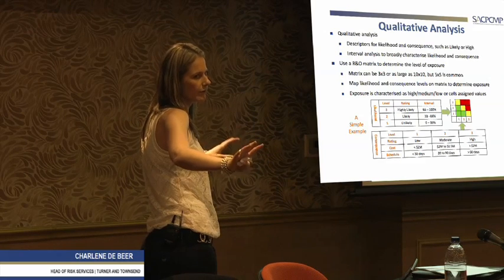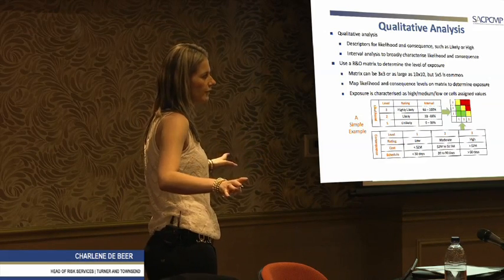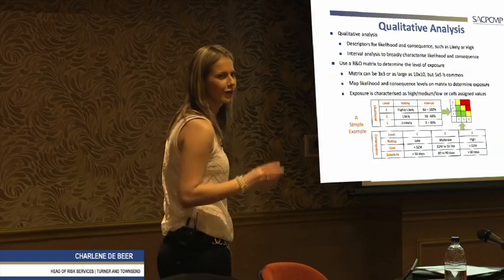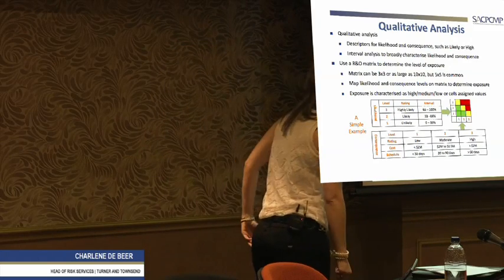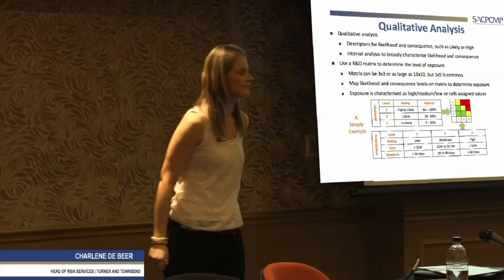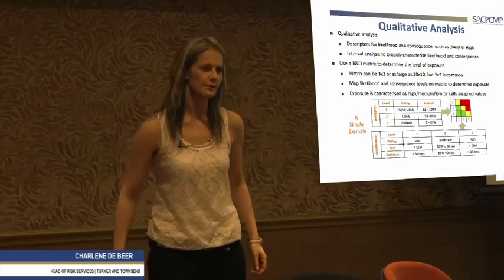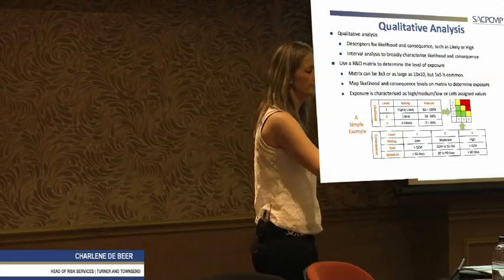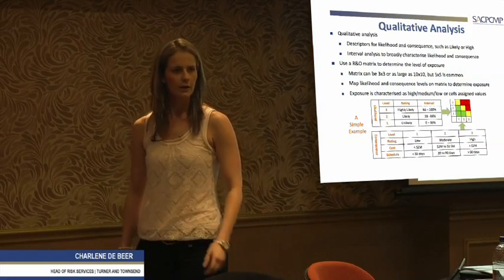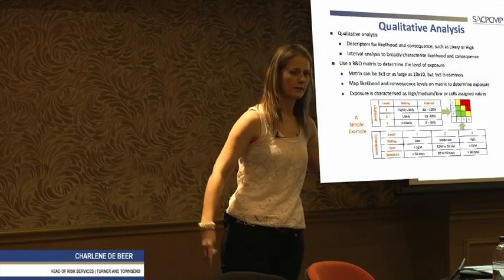All your risks would be 50-50. We'll all sit on the fence, and it'll either happen or it won't. So I've never in my life presented any project team with a 50% option. And it quite fascinates them. Because sometimes they'll ask, what's the likelihood? They'll all go, oh, it's 50. I said, well, you don't have a 50% option. So you have either a 35% chance of it happening or 75.